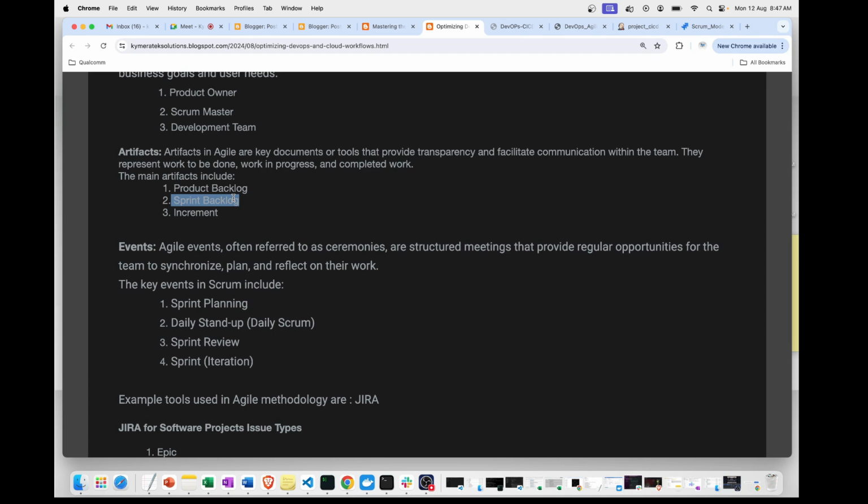So during the sprint of 2 weeks, let's say Monday to alternate Monday. Now within 2 weeks, out of 100 requirements, I'll take 10 requirements and assign them to the developers. Okay, so these 10 requirements assigned to the developers is called the sprint backlog for a 2 weeks sprint.